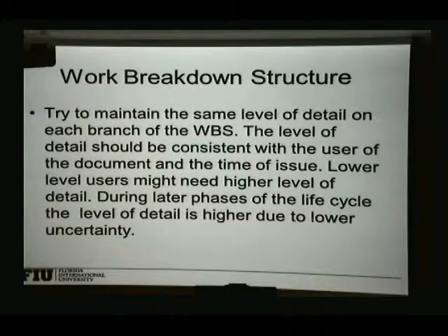If you have a very high probability of getting the job, you want to do a very good detailed estimate, because that's going to be easier for you when you go to purchase the items. If you are not sure and you don't want to spend too much time, then you just count how many doors you have, you multiply by an average price, and you hope for the best.